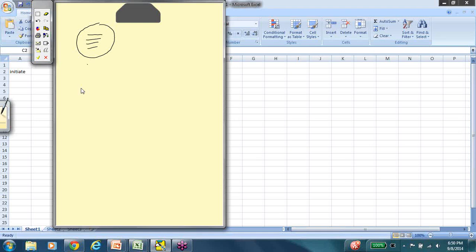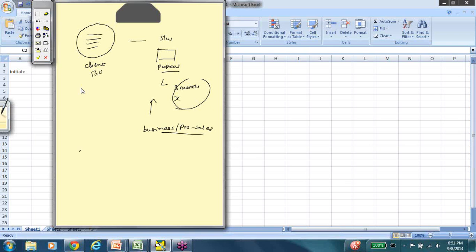Let's just go on. So the client or the business owner, they have a few requirements. And then the software service provider has had a proposal document for which they have agreed on a few high-level things, for example, we'll take 3 months to build this software, we'll charge X amount of money, and we'll need so and so infrastructure from your end. So all of these agreements, the people preparing the proposals, presenting them, accepting them, these are high-level business or pre-sales representatives. Usually these are not the people who will directly work with the project.